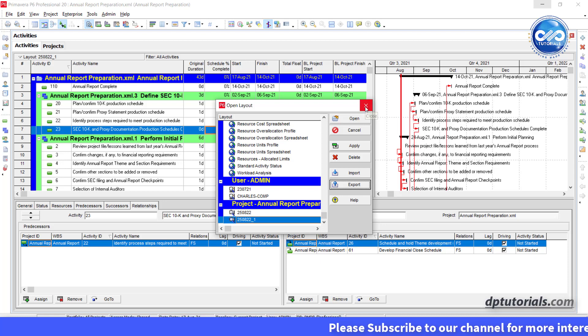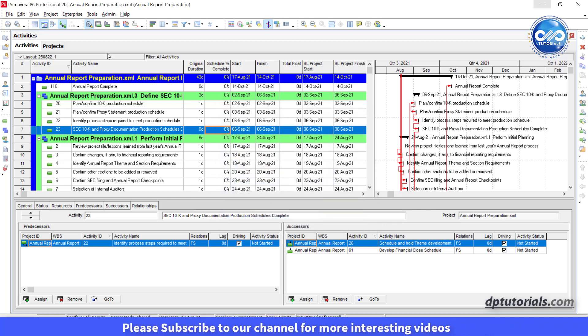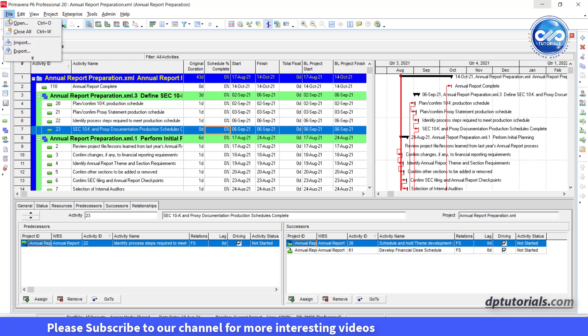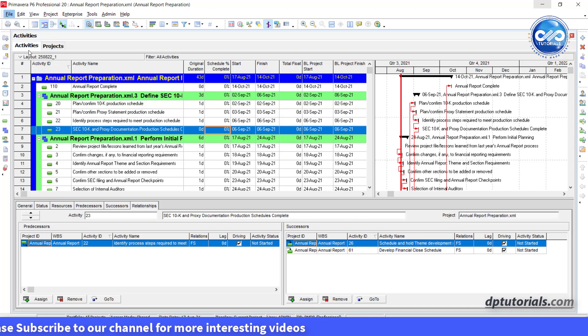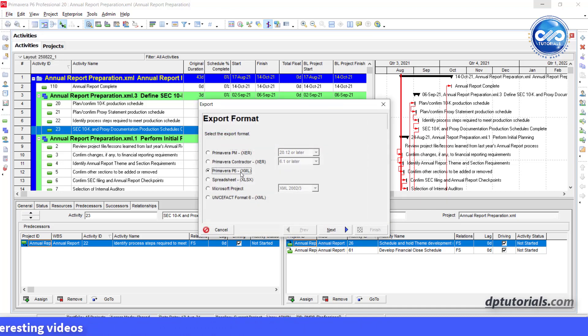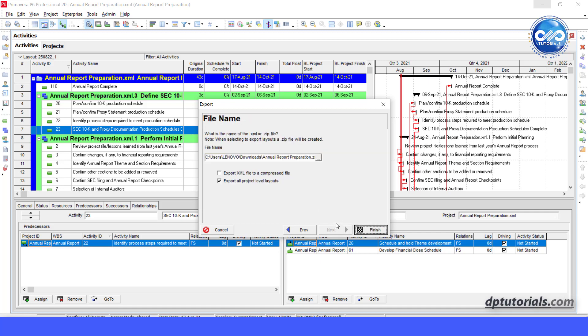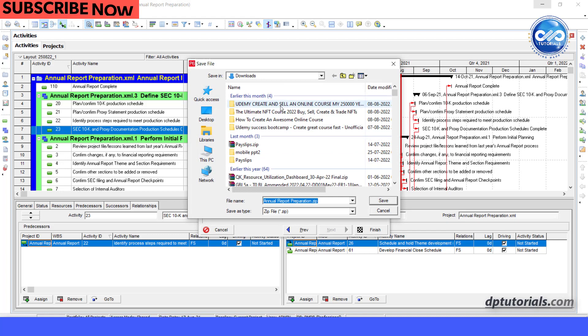But if you want to export your project in this particular layout, go to file, click on export and in the export format dialog box, select xml format option. Click next. Select the projects to export and click next. In the file name dialog box, give a name and select an appropriate folder location to save.